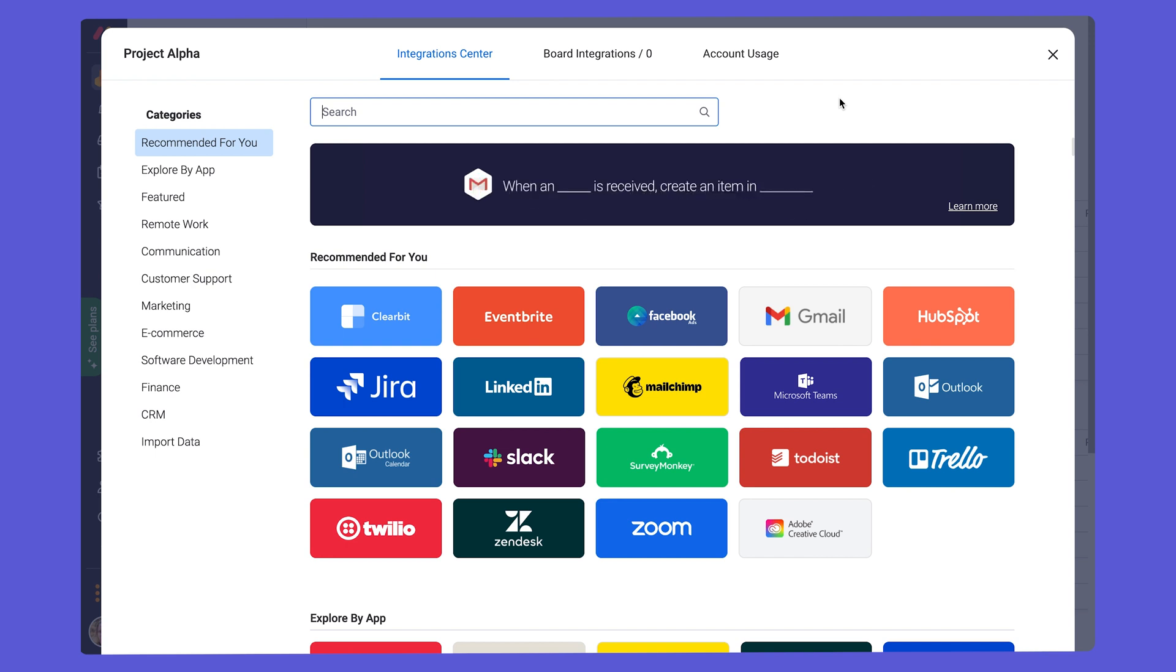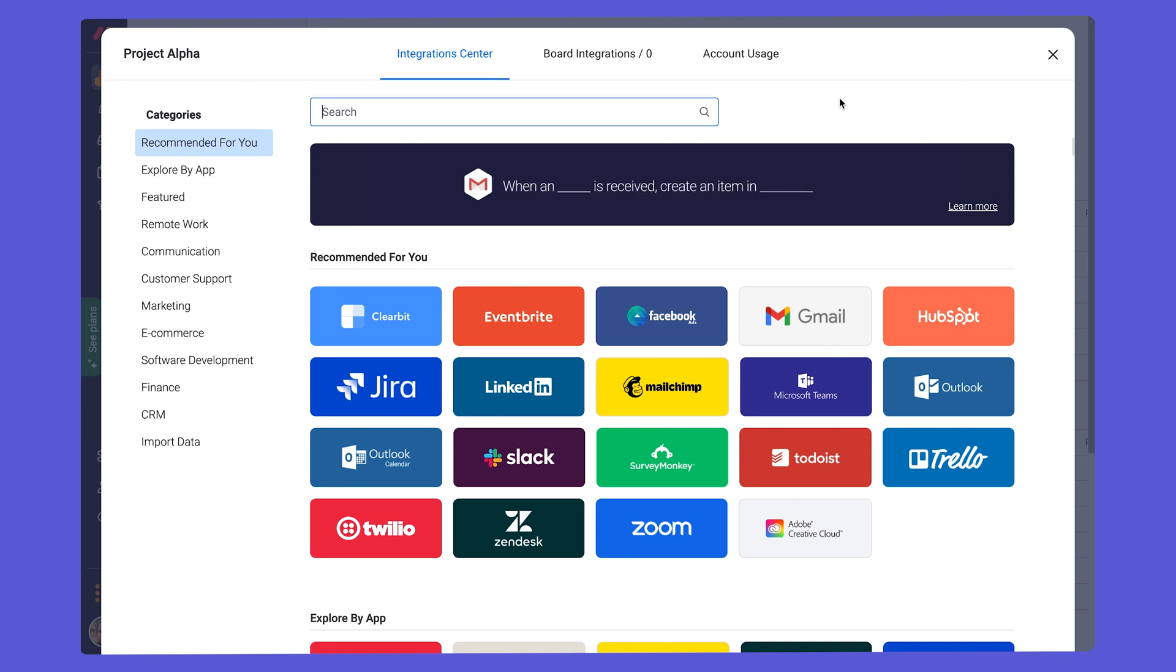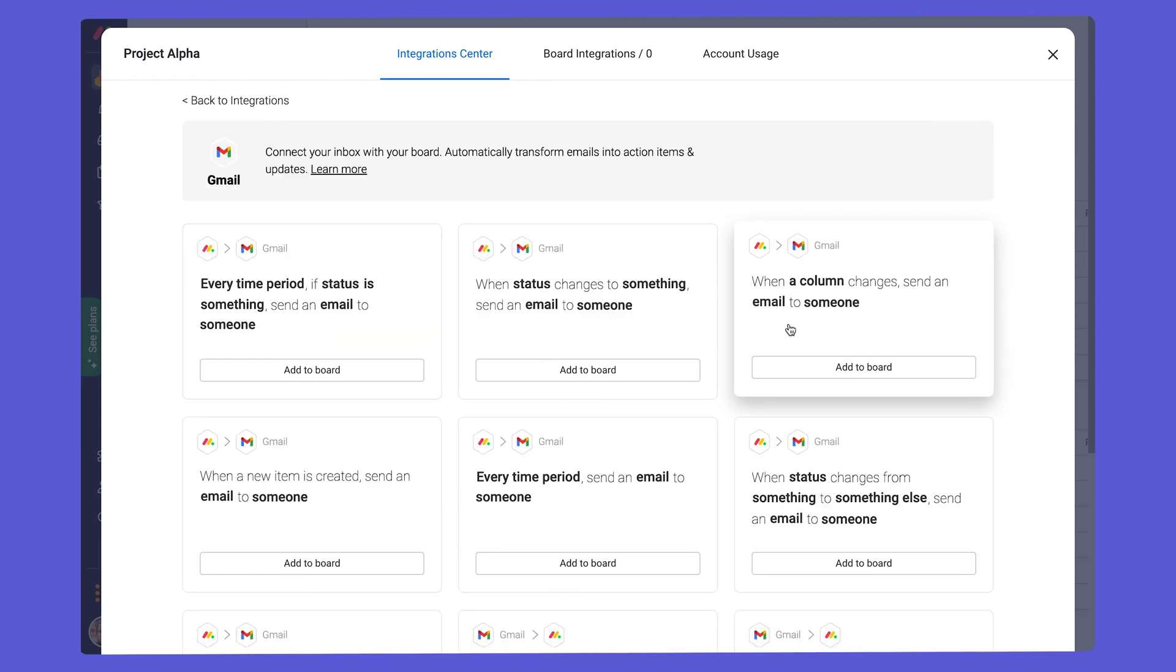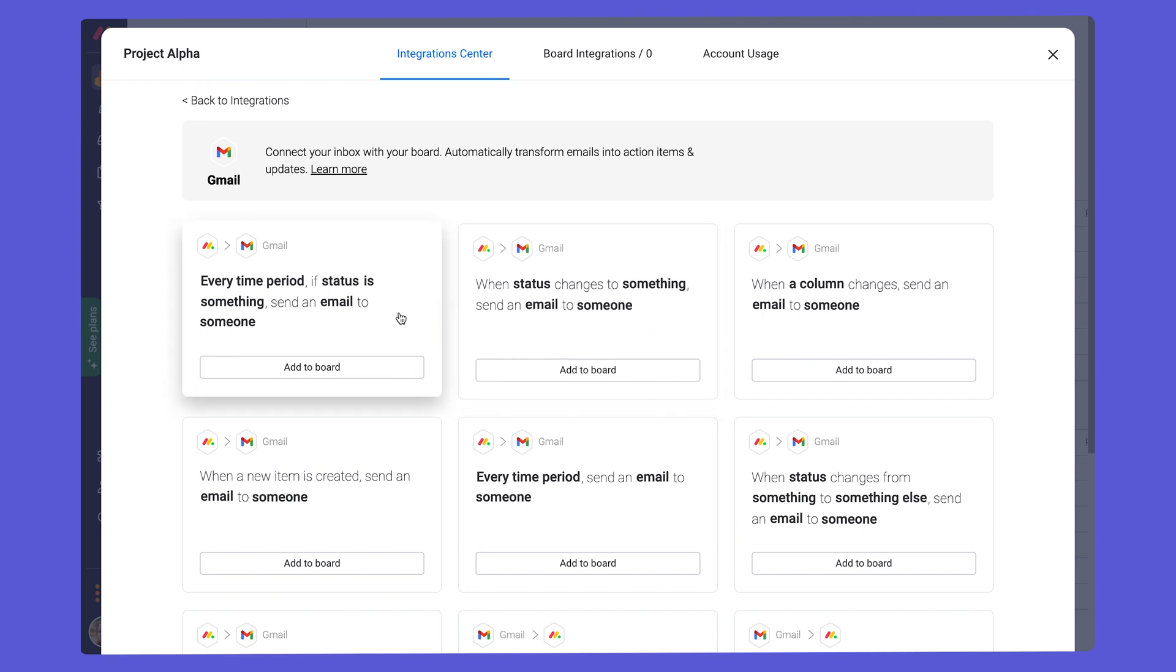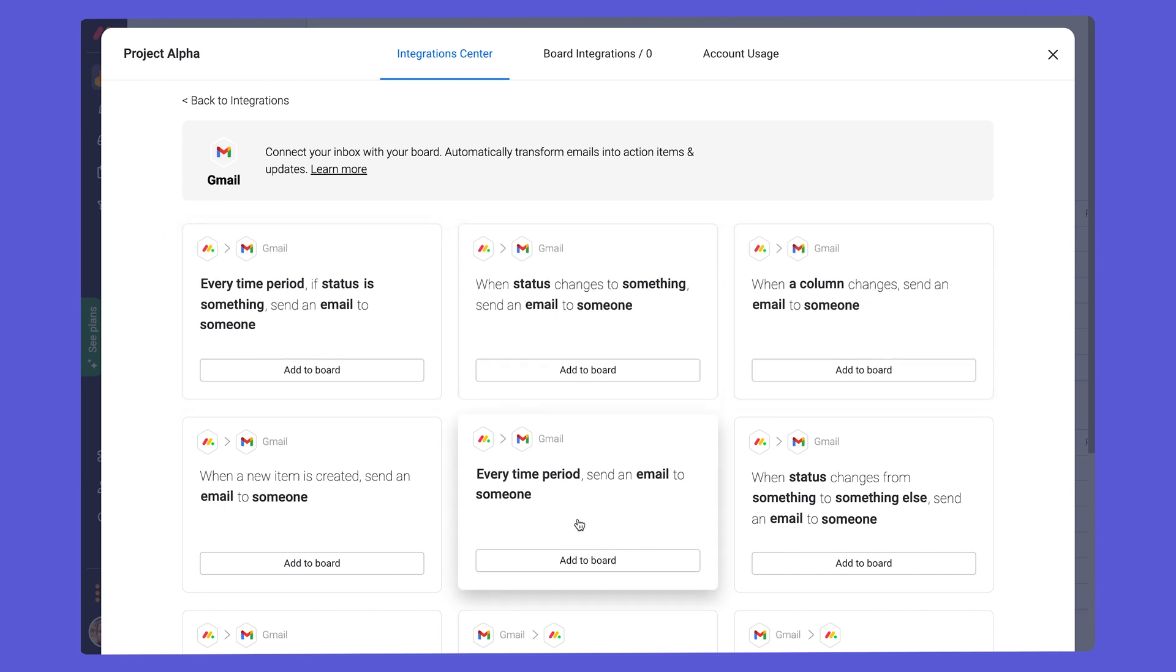Probably the most popular integration is with Gmail and Outlook. By integrating your board with these platforms, you can send reminders or other important information about your project via email to stakeholders, including team members or clients. There are a huge range of recipes to choose from. So while in our integration center, if we click on Gmail, we can see all the different things we can do. If a status changes, we can send an email to someone. If a column changes, if a time period is in a certain timeline, you can send an email to someone. There's so much you can do here.